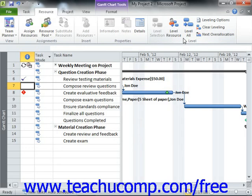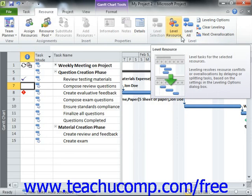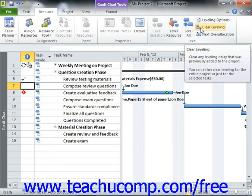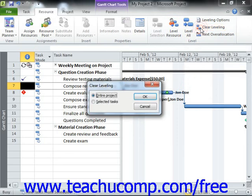If you decide to manually level each resource or task individually within a project file, you can also use the Next Over Allocation button in this button group to select the next resource over-allocation to resolve. You can also clear a resource leveling that you have applied by clicking the Clear Leveling button in this button group. A Clear Leveling dialog box will appear where you can choose either the entire project or selected tasks, then click OK to remove the resource leveling.